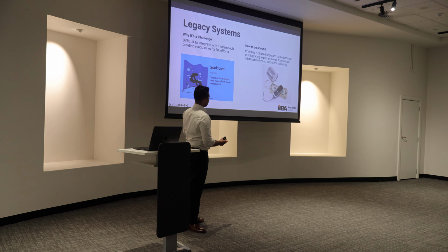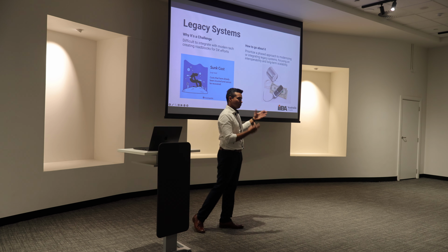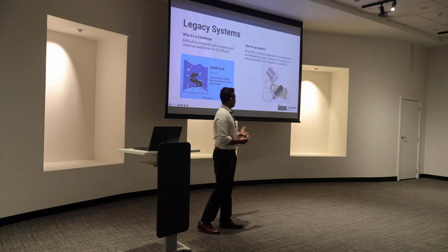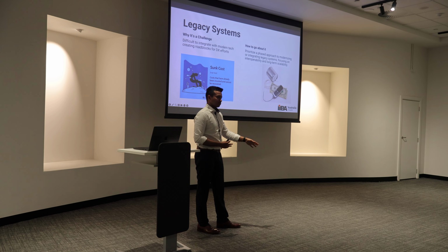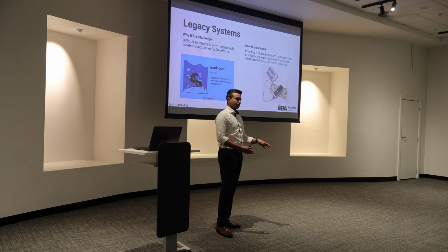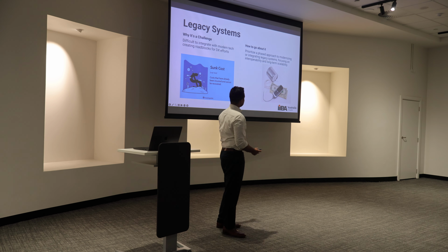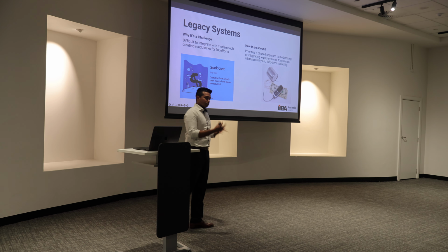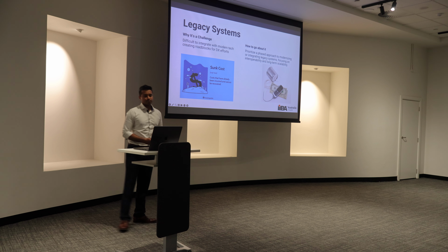The problem that happened with this project is we were trying to replace everything, or trying to integrate everything together. And we had to stop just to make sure people don't get too overwhelmed and there's not too much change that people can't absorb. So we did a phased approach, we did one by one, and sort of managed to scale from there.